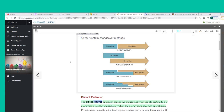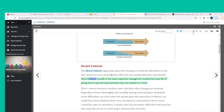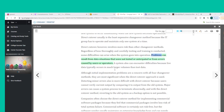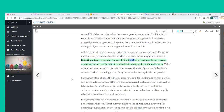The direct cutover approach causes the changeover from the old system to the new system to occur immediately when the new system becomes operational. It is usually the least expensive changeover method because the IT group operates and maintains only one system at a time. However, direct cutover involves more risk than other methods — problems can result from data situations not tested or anticipated, or from errors caused by users or operators. A system can also encounter difficulties because live data typically occurs in much larger volumes than test data.